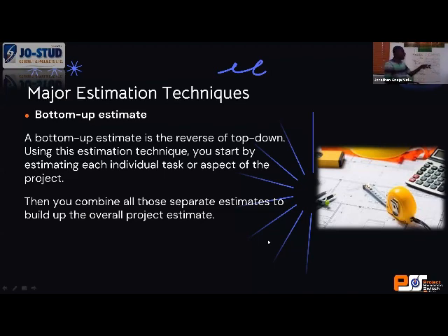Then you go ahead and lay the blocks. How many blocks can go into a 200 meter foundation? The length of a block is maybe 450 millimeters. You now divide 200 meters by 450 millimeters. You are likely to get approximately 400 blocks in the foundation per course.